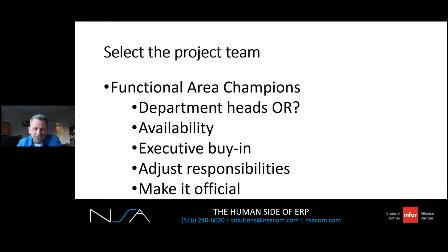Help your champions succeed. If you're putting them in the job, you're putting them in the responsibility for a period of time during the project, make the required changes to their job responsibilities and communicate them to the people they work with. Make it official, send a communication, so they don't have to explain why they are not as available as they were in the past.